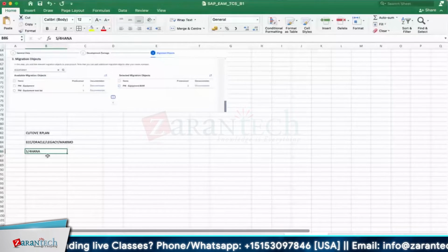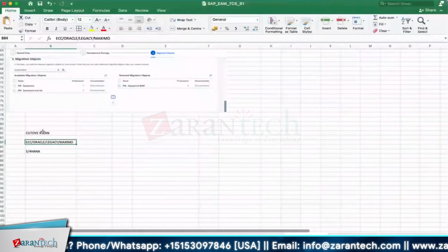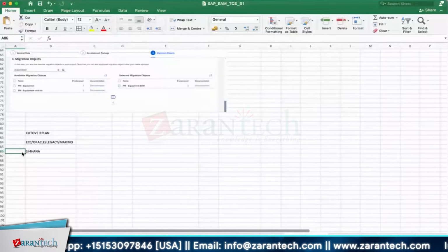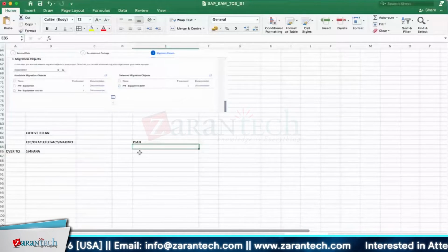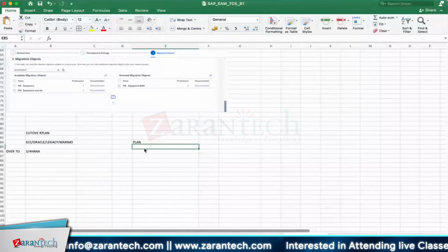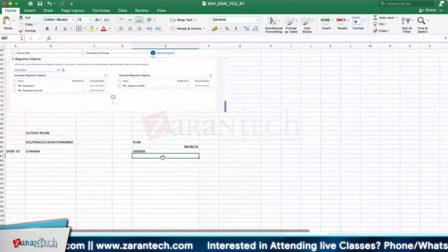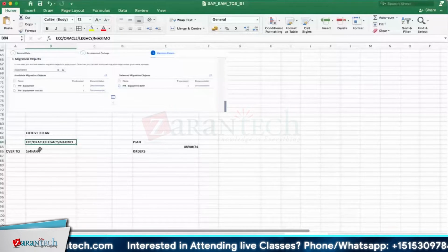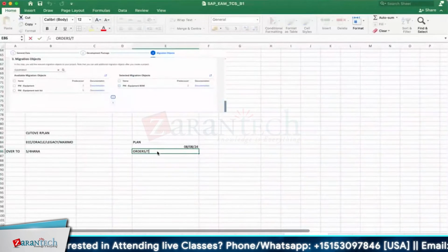You're cutting this system, whatever you were using earlier, like ECC or something, we are cutting that particular thing and we are cutting over to SAP S/4HANA. And then what is your plan for that? Those activities we have to put up. Example, say today all accesses are removed in Maximo for creation of the order. Or some cutoff date will be mentioned. Say today is 8th, right? By the 8th, all orders in Maximo should be completed. Or legacy, whatever is there, that report should be maintained and given to load this particular data. Oracle also the same. ECC also, TECO, it should be TECO or technically closed orders.